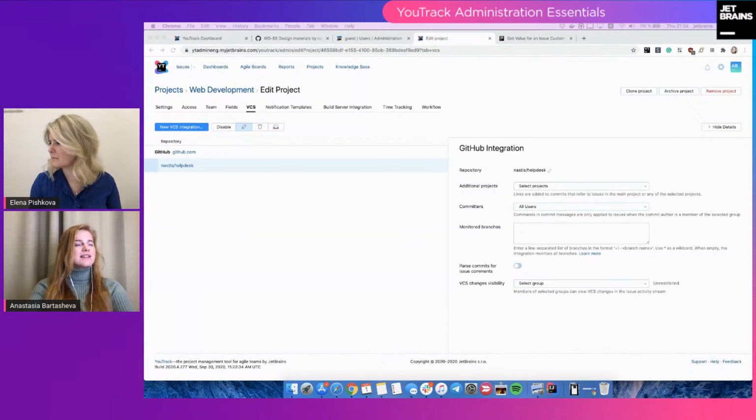Say someone is stuck in the progress of the task. How can we spot it? I can tell you how we do it in our YouTrack. We have a workflow that tracks if an issue is in progress for 3 days already, and if it is, it tags this issue with a special tag, like 3 days in progress. And we use an Agile board to track our progress. So these issues are always visible. I mean, we don't miss them.